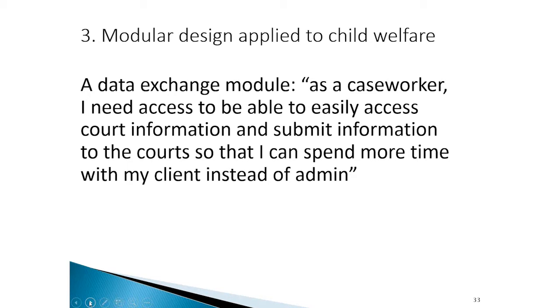Now, each of those example CCWIS modules, I would say, are an example of what you end up with if you did a breakdown or an analysis of all the different types of work that caseworkers need to do, or all the work that's involved in delivering child welfare. I think what you end up coming up with are common areas. So, for example, in the work that I did with California, we started identifying high-level groups of tasks, and those high-level groups of tasks were what informed what became RFPs and RFOs and requirements for modules that we wanted to develop or that we wanted to procure in California.